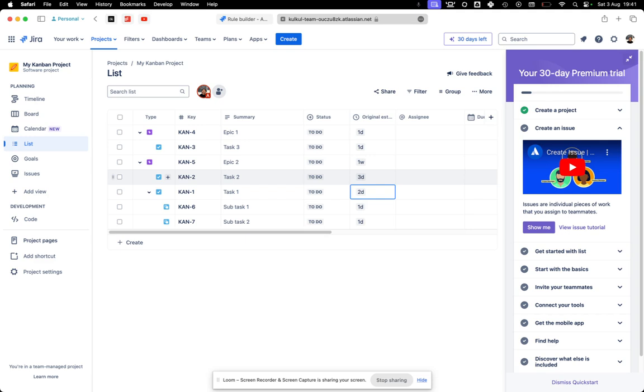But the summary is: create the same automation. One is for task, the second for subtask, and for task, you want to enable other rules to trigger that automation. So basically, enable it to do a recursion. So that's my small tutorial.